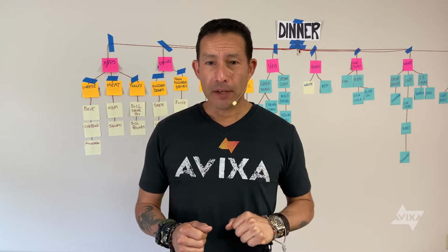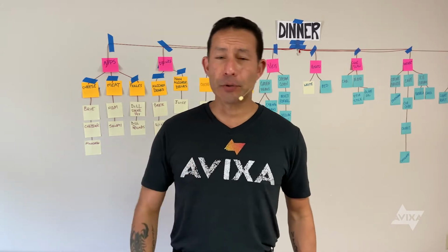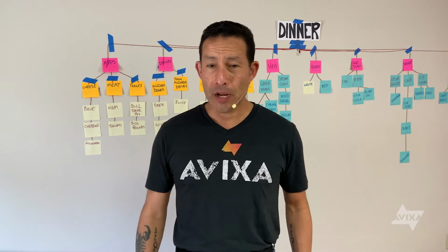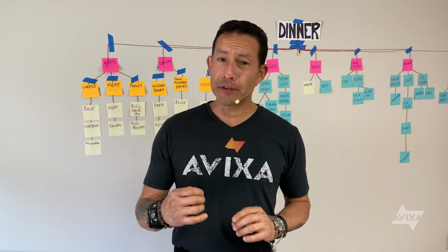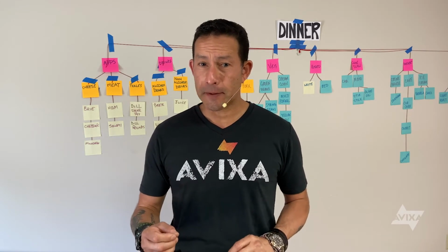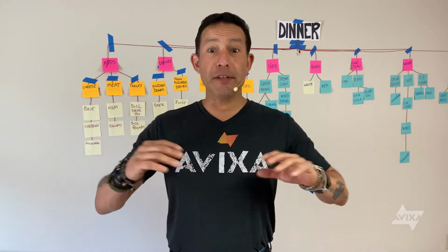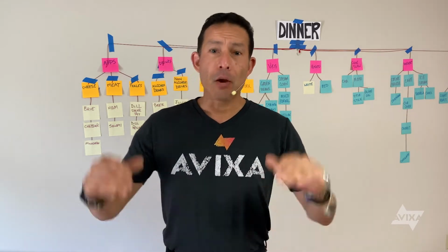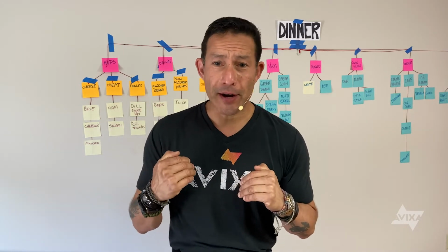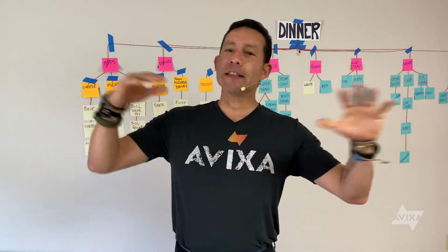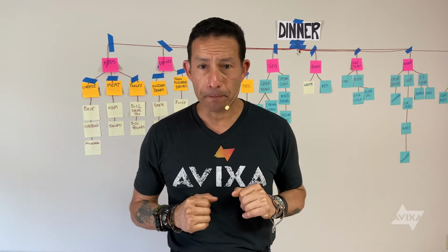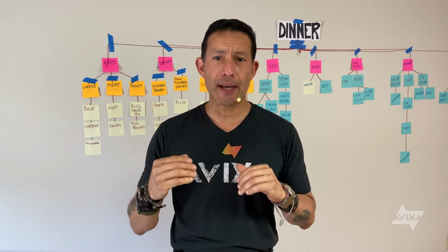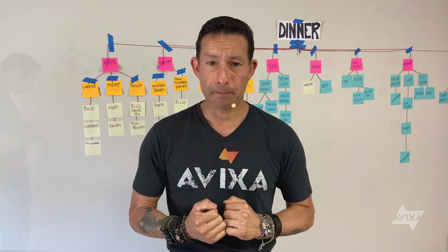For example, say you allocate 5 weeks to do a job and the client asks if you could do it in 2. If the sprinkler system still needs to be installed in the space, you aren't going to be able to install your AV system first without risking damage. When I create my logic network diagram, I could do it for any level of my work breakdown structure. It all depends on how granular or detailed you want to get in the prediction of your timeline.